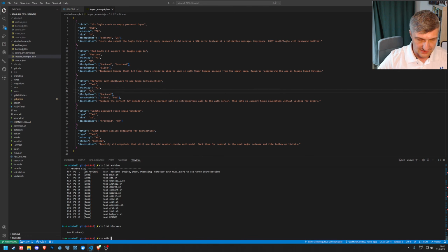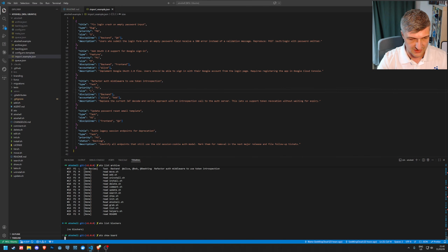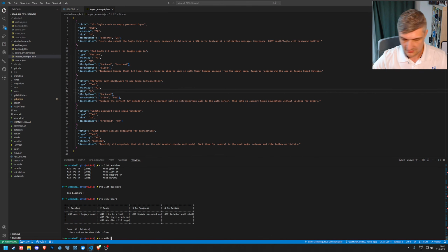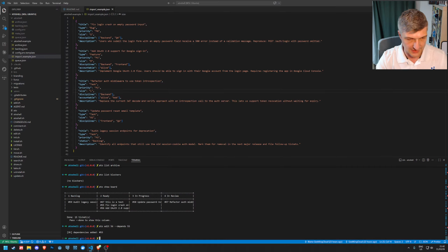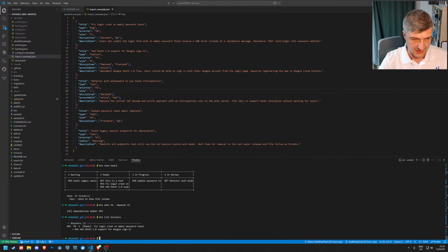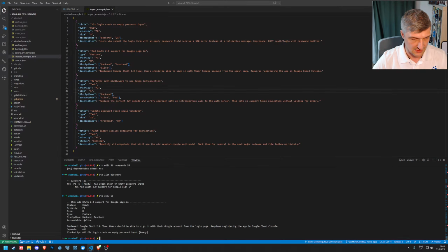Okay, so let's do Atto edit. Let's do ticket number. Let's do Atto shell board again so we can see what we're working with. Atto edit 58. It's in progress, so we don't want to do that. So 56. And we'll do depends, and it depends on 55. All right, dependencies added. Now we do Atto list blockers, and look at that. It's showing 55 blocking 56. So Atto show 56, and it shows right there. It depends on 55. It's blocked by 55.